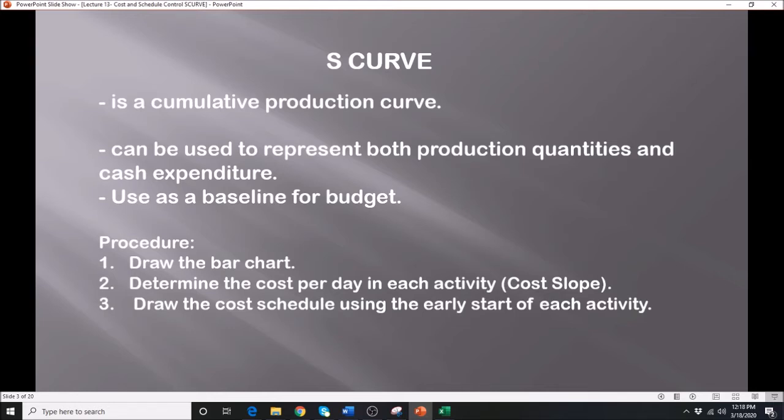Okay, so again, if the actual, as you plot them, you're going above the curve, it only means two things. Actually, four things. One, either you are over budget or under budget. The third and the fourth one is either you are behind schedule or you are ahead of the schedule. So those are the four things that will prompt you as a project manager to make a decision.